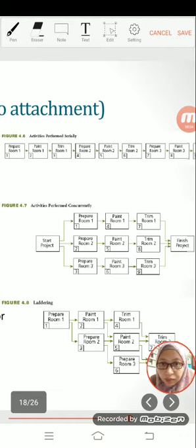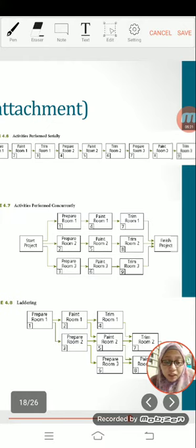In the first figure, although you have 3 workers, you can only use 1 worker at one time. Compared to the middle figure, when you start the project, all 3 rooms are prepared by different persons. So you will use 3 different persons, and you will finish preparing, painting and trimming the rooms at the same time.